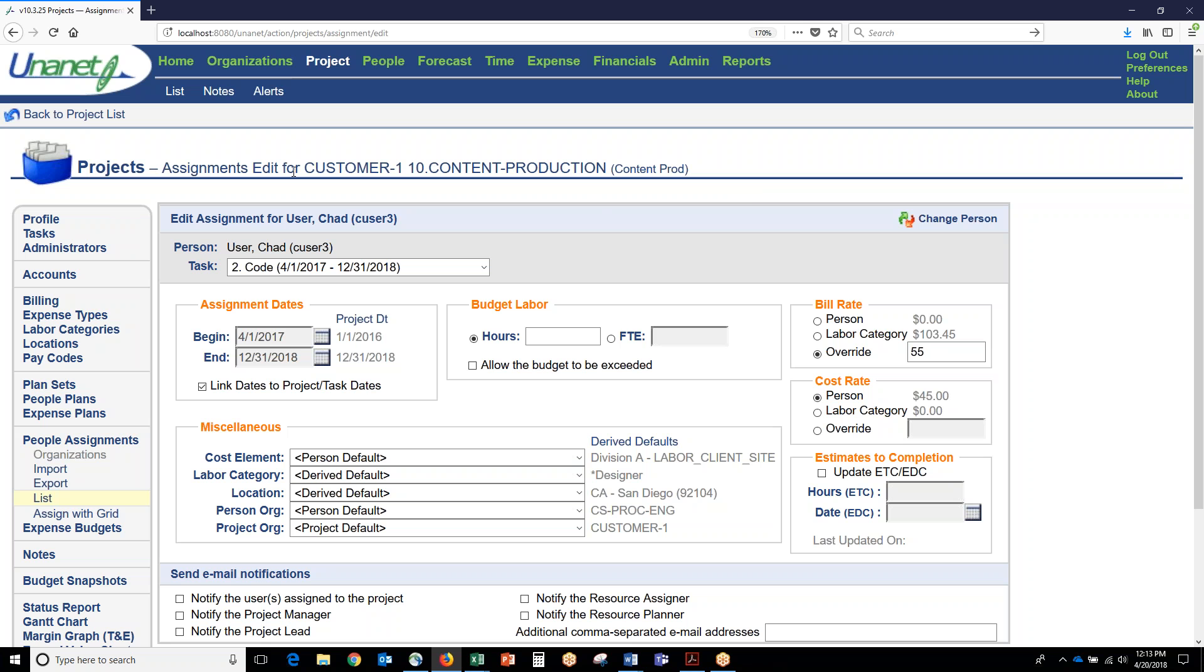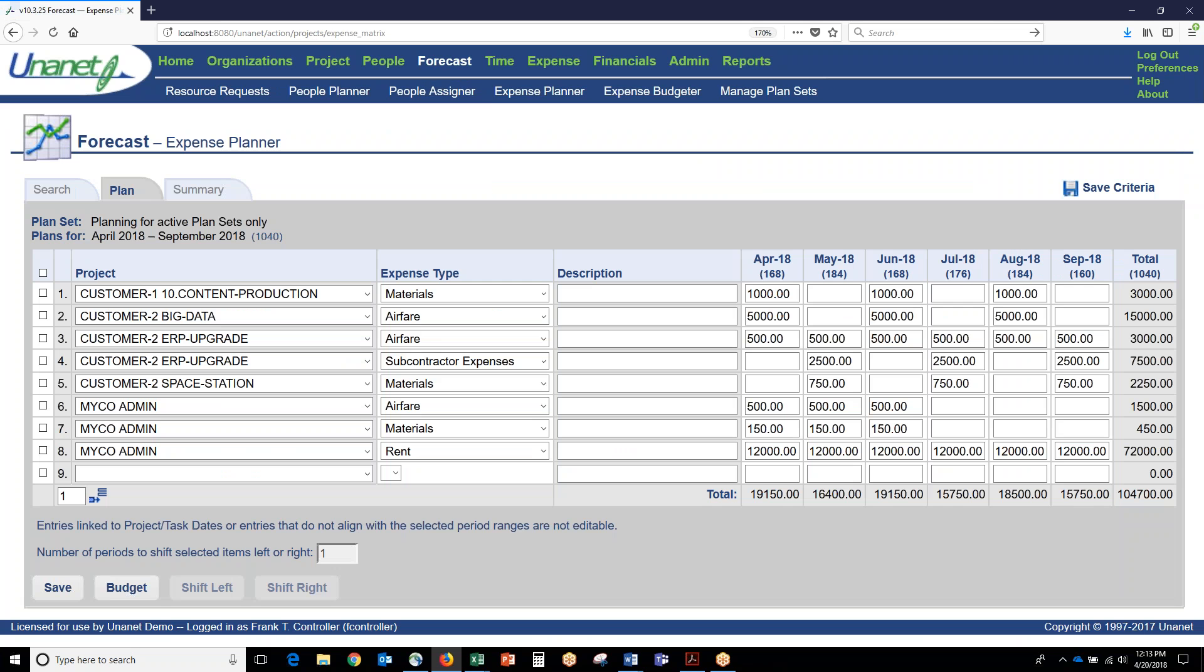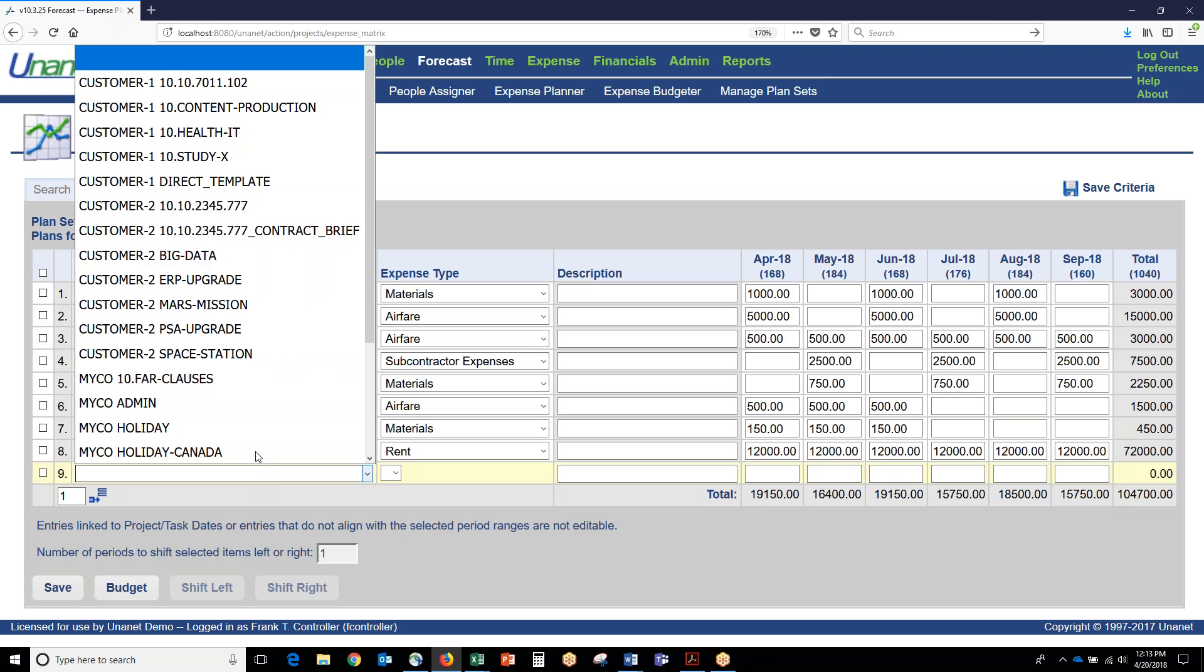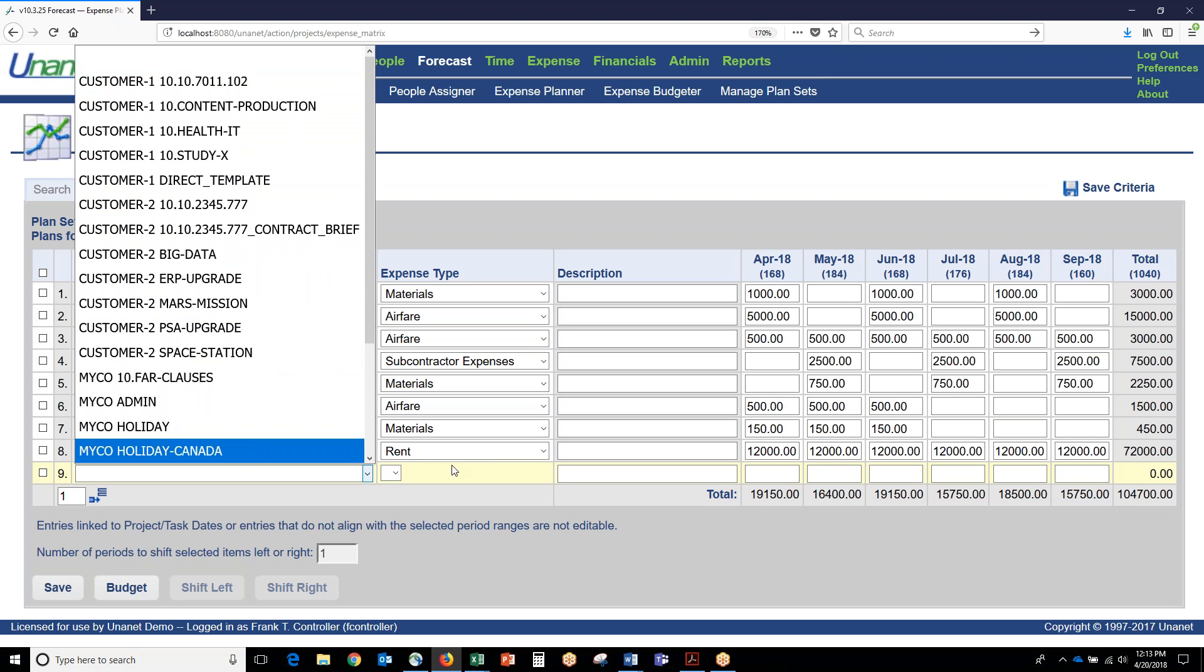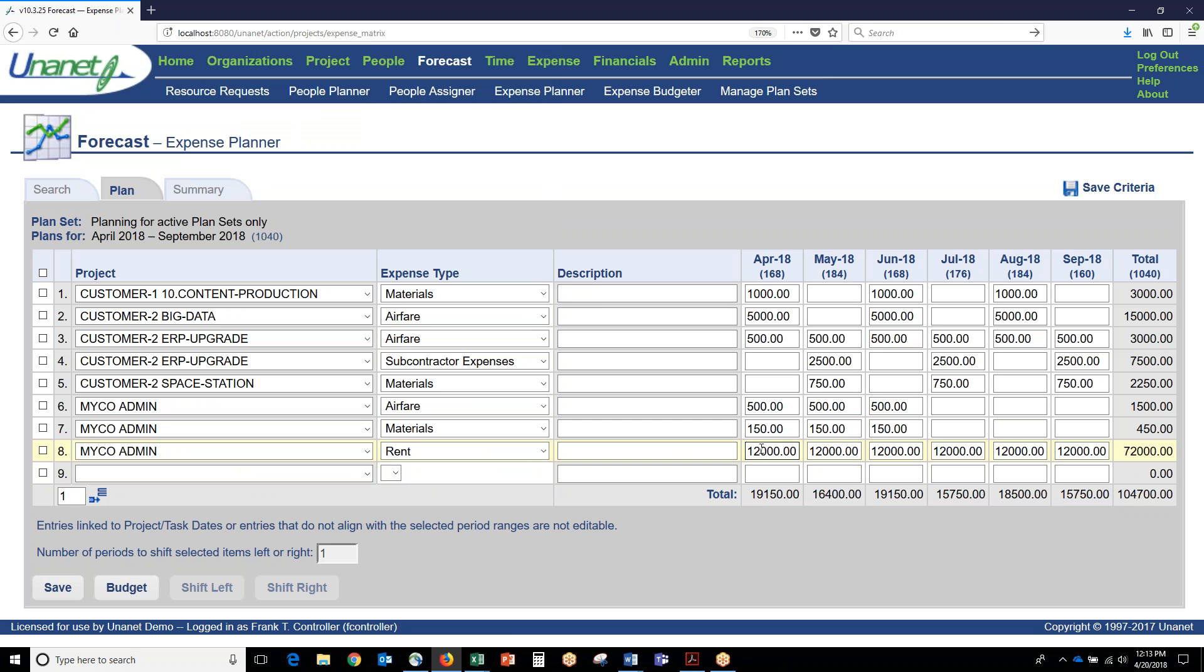In addition to the labor component, you can also plan out expenses or other direct costs on different projects. Basically, you pick the project, whether it's direct or indirect. You have a list of projects you can plan here, a list of expense types that are valid for that project, and then you can basically plan that out into the future.